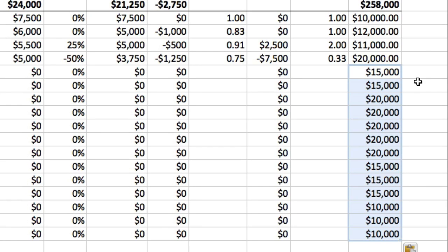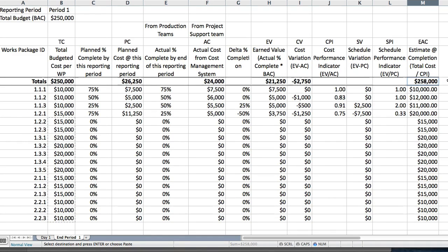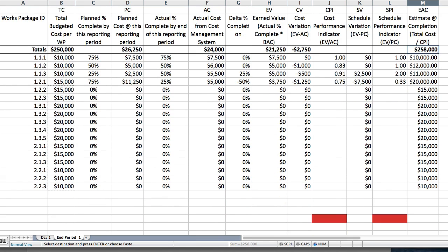That is a little controversial, because we're assuming future work will go as planned and not taking into account past project performance — which is what earned value analysis is all about. We should really be multiplying each work package budget by the average CPI to date for a more accurate estimate at completion. That's another level of sophistication we can discuss later. For now, we can see we are slightly over budget at the end of reporting period one — nothing too serious at the moment, but let's keep our eyes and ears open.